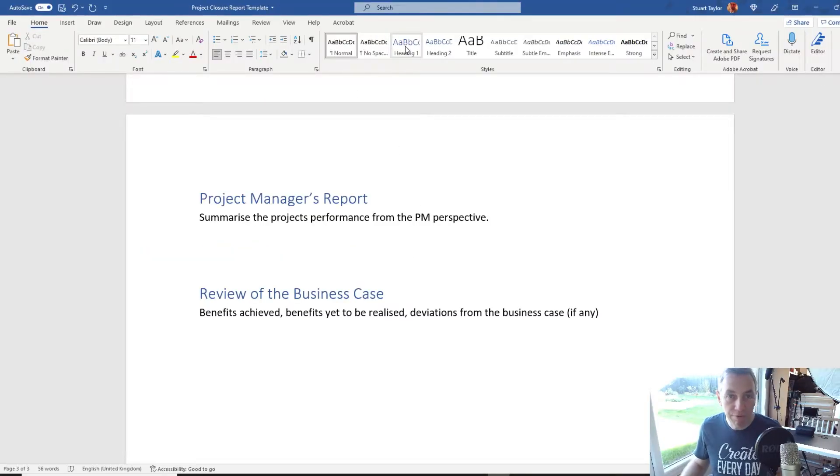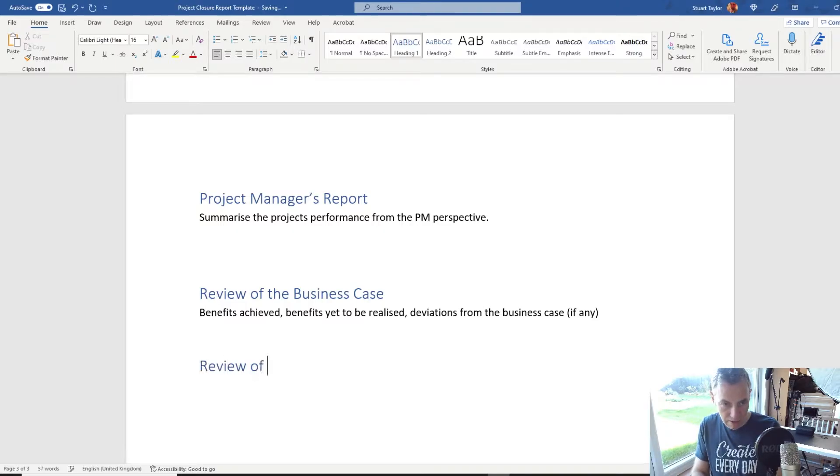The next section is the Review of Objectives. There's a lot of comparison going on here with the business case and other earlier estimations. To make it easy to get this report created quickly, I'm going to create a table that compares the original estimation and the final outcome. I'll include a column that looks at the impact of any change requests that have altered things as the project's gone on. If something was delivered later than expected and a change request explains that, it's useful to have that linked in there.